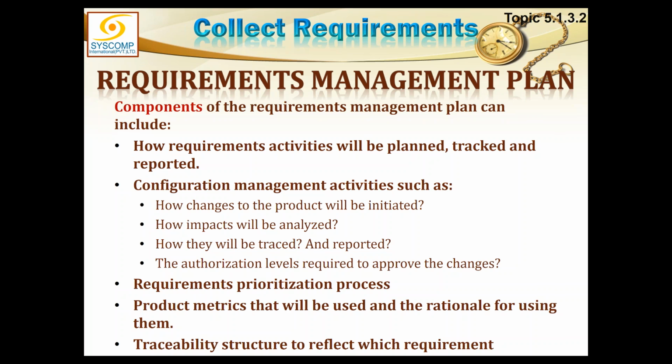Configuration management should include how changes to the product will be initiated, who is allowed to initiate the change request on the product, how these impacts will be analyzed, who will analyze how this change has impacted us, how they will be traced and reported, and the authorization levels required to approve those changes. So this all is part of the requirements management plan.